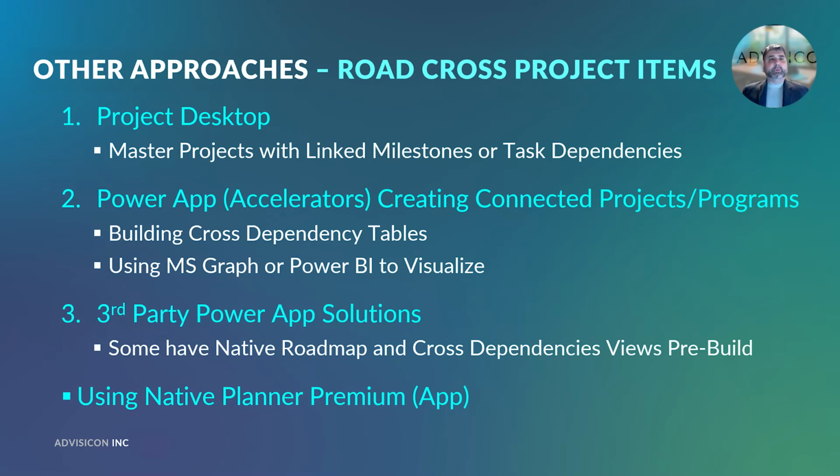So first off, in the past, we used to have that desktop approach, which was that master schedule. If you are using Power Apps to wrap around multiple schedules, this allows you to bring things together so you're headed the right direction. However, if we're thinking about connected systems, about making sure that all of our Planner Premium schedules are combined, there's a little bit more effort that will need to happen. But at the same time, these planner schedules are really based upon you creating enterprise fields through the Power Platform or a Power App so that you can actually do the reporting or see these custom fields or custom resources flow together. Again, that's intentional by Microsoft.